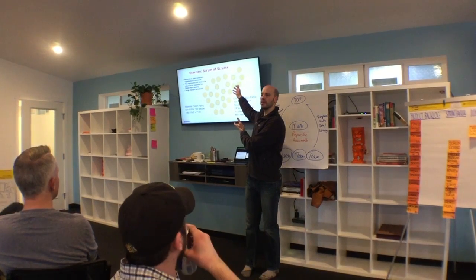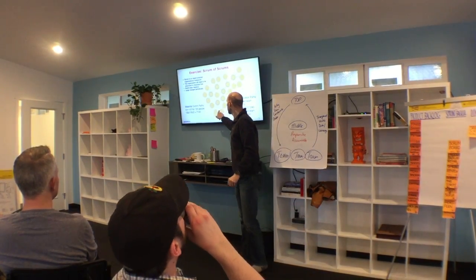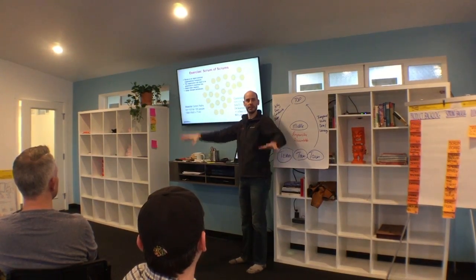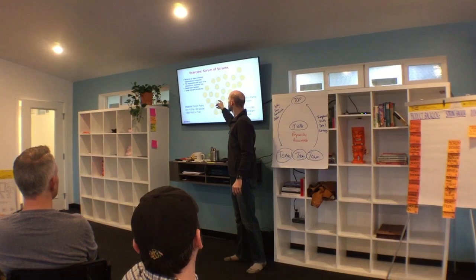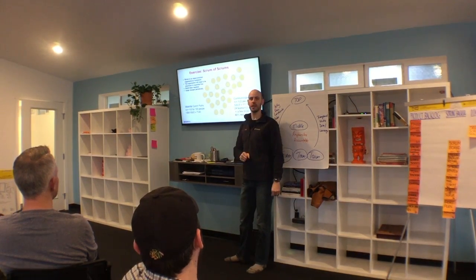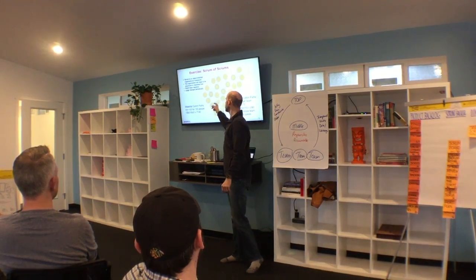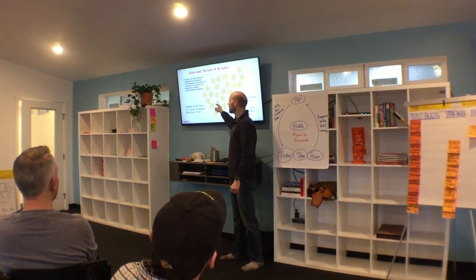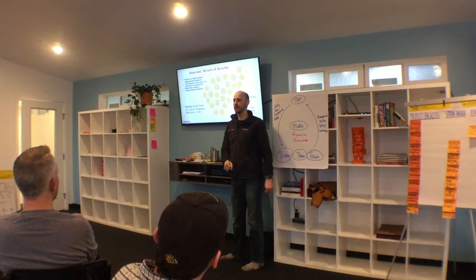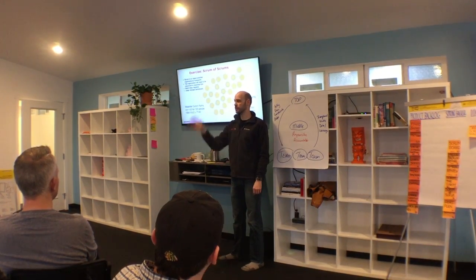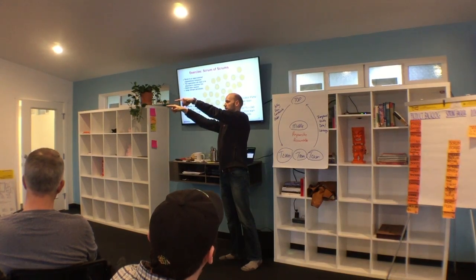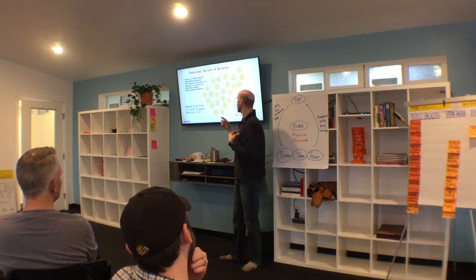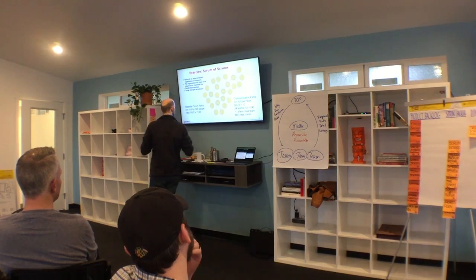This is a diagram of Scrums. Each of these orange circles is a daily stand-up meeting, which you've just practiced. Each of these double circles is a Scrum of Scrums, where one person from each team, usually the Scrum Master, but not always, meets in a daily stand-up after the daily stand-up. The format is identical. There's a Scrum Master of Scrum of Scrums recording accelerants and decelerants, just as the Scrum Master does in the daily Scrum. And they're coordinating accelerants and decelerants across teams.